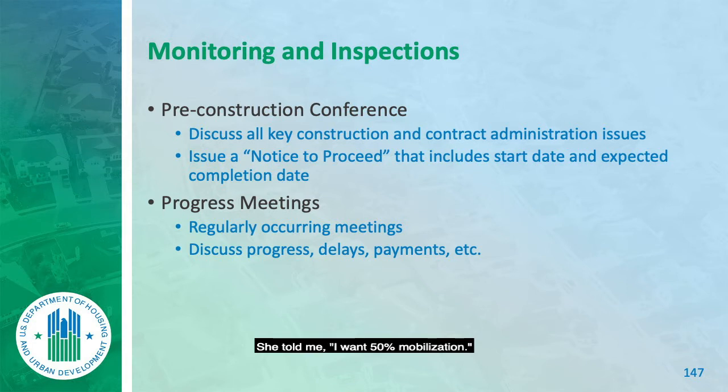So this lady in Georgia, this construction lady the other day, it's been a year and a half, she told me, I want 50% mobilization. And I said, nah, we don't do deposits. She goes, boy, you don't know how we do stuff in Georgia, and this is the way we do it. I want 50%. I got it from this housing authority, I got it from that one. We wouldn't do it. Of course not, it's a deposit. We don't give deposits. We only pay for stuff once it's been received.